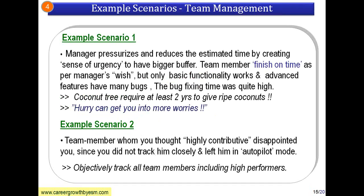Let me take some case studies of team management. A manager pressurizes and reduces the estimated time by creating a sense of urgency. What happens is the team member finishes the work within the reduced time, but when you finish work under pressure with reduced time, the quality will be very low.